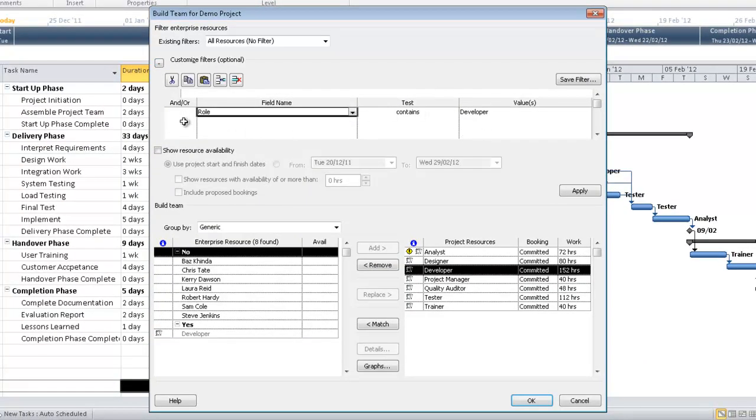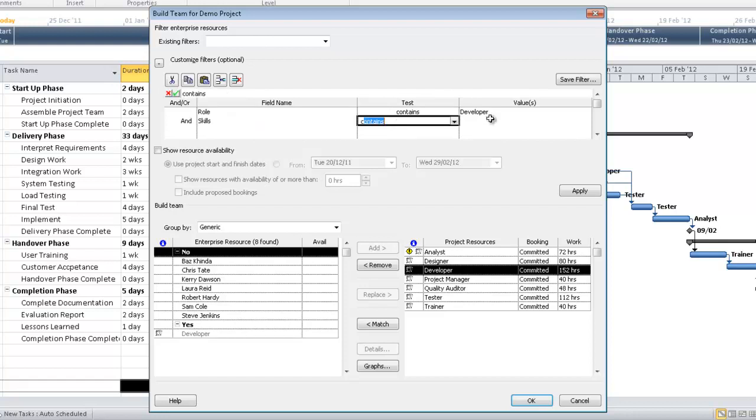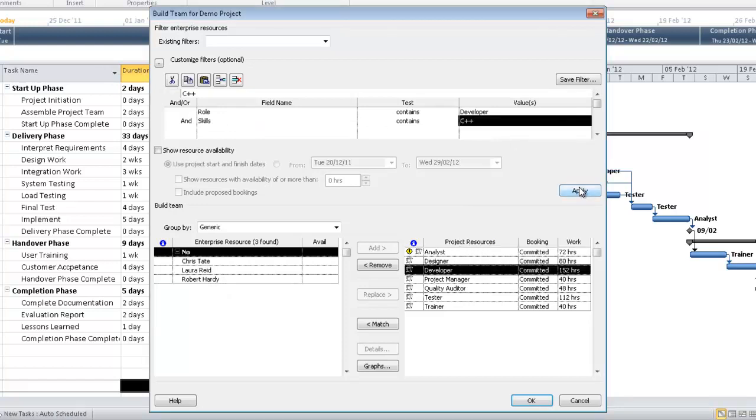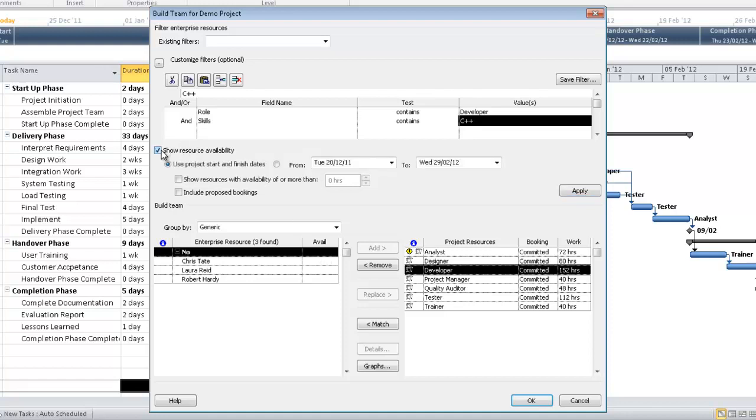I could drill down further and say I'm actually looking for a developer that also has specific skills. In this scenario, I'm looking for a developer who also has knowledge of C++. If I then hit apply, I'm now presented with a shorter list of people that not only have the job title of developer, but also have skills with C++. One thing that we can't see at the moment is availability. If I check this box here, show resource availability, in this scenario, I'll use the project start and finish date. In the real world, you would probably want to drill down to exactly when the work is going to take place. If I hit apply, I can see that I need a developer for 152 hours.